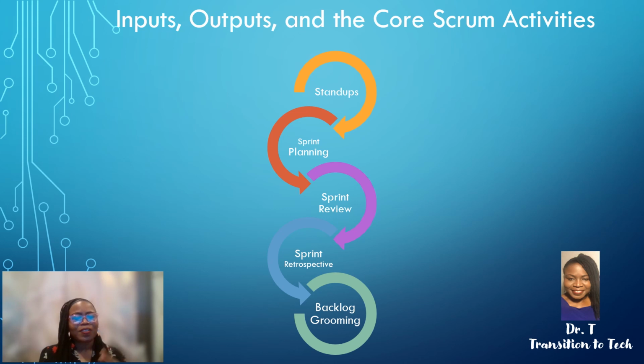Now let's look at the Scrum activities. There are 5 main activities that the Scrum Master is there orchestrating. So they're daily stand-ups. The daily stand-up has as an input the team roster. We could start there. Who's on the team? What's their commitment level to the team? Are they 25%, 50%? Are they persistent team members? And what capacity do they serve in?